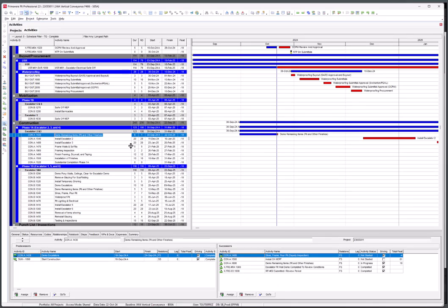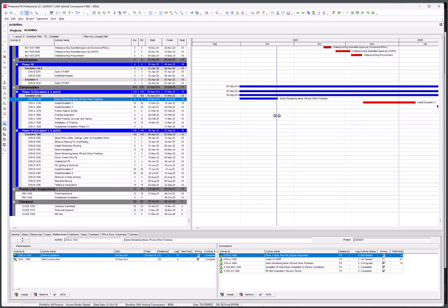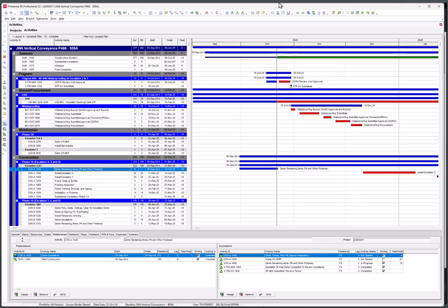Okay, back on the P6. Keep on going down the blue line. Let's see if there's anything else hugging it. Okay, so nothing else. So really, on the blue line there were 3 issues, right? That were kind of lying on that blue line, which are critical. So I ran the longest path. That's the first pass. Then the other thing you can do is, these are all longest paths or negative or 0 float, but there could be other things that are really close that I want to start looking out for.